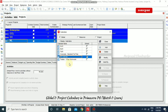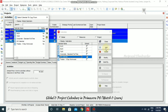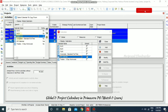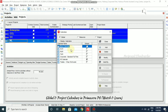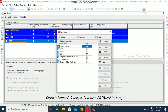To create a new calendar, click Add and choose which template you want. For example, 7x24 is a 24-hours calendar, or you can go for 5x10, which is 5 days at 10 hours. Click the plus button and a new calendar will appear. I am creating a 6-day calendar and then clicking Modify.